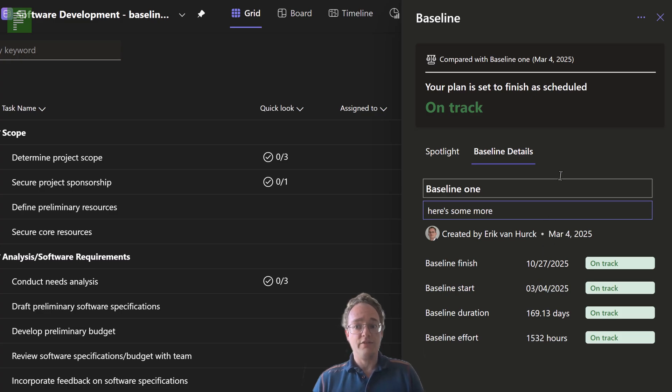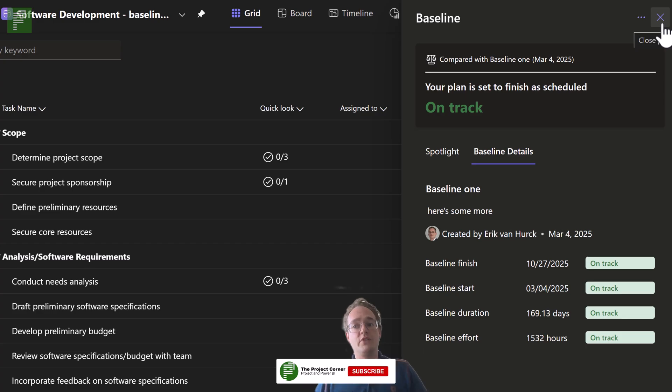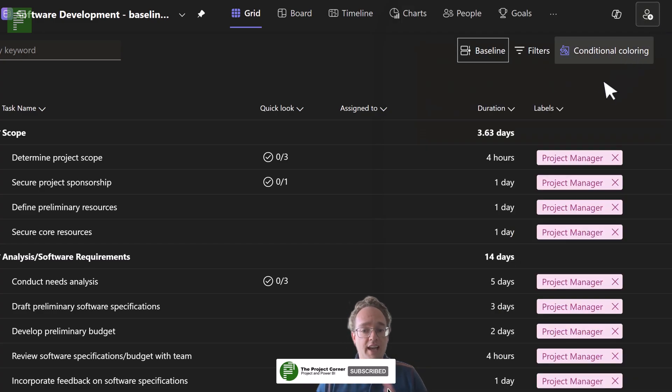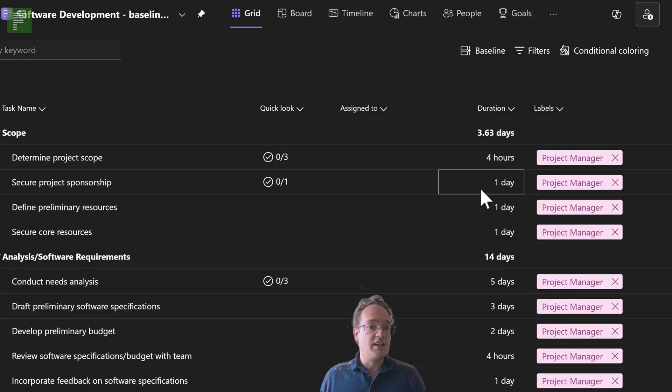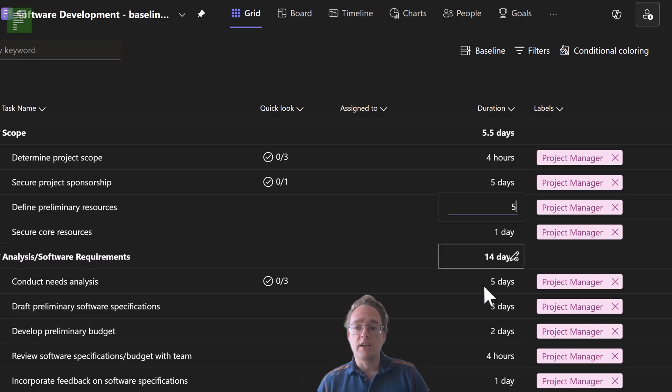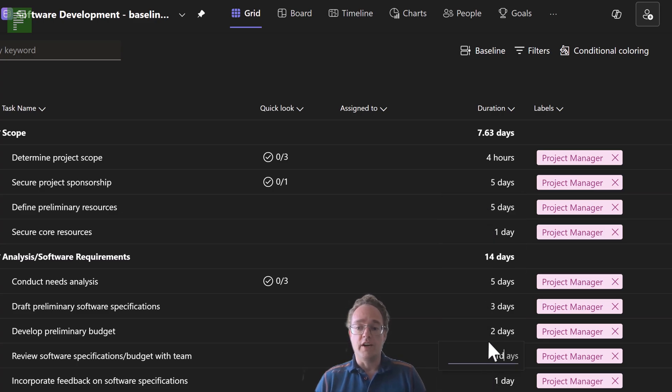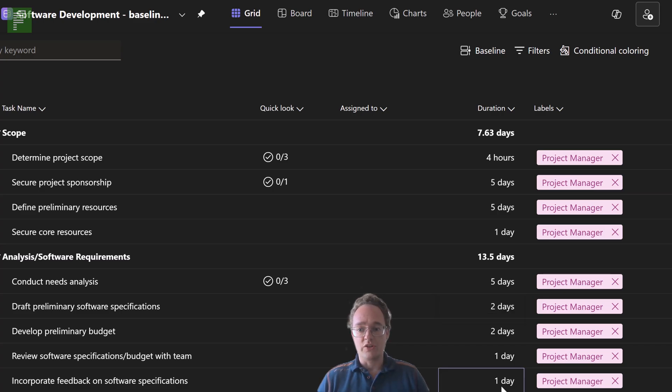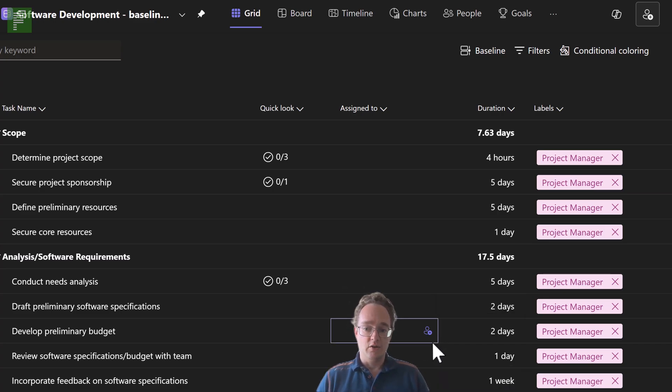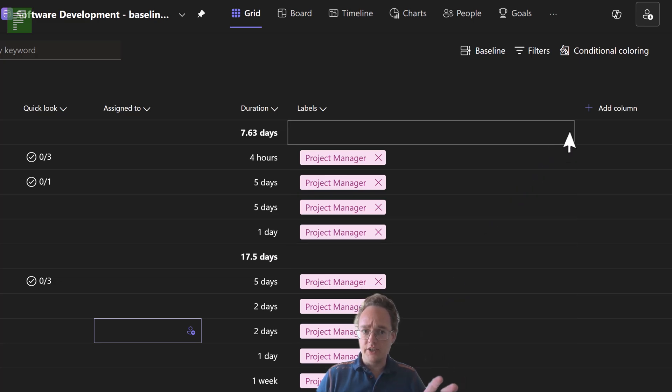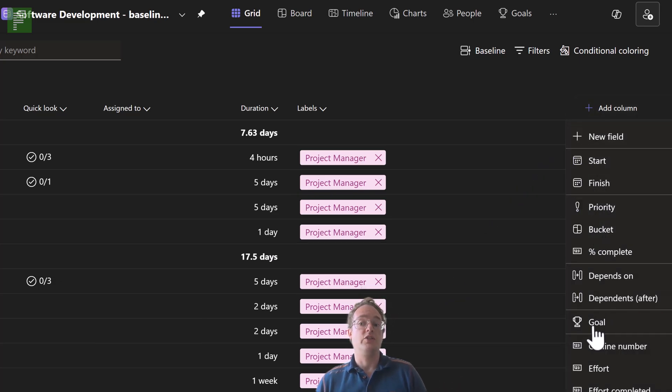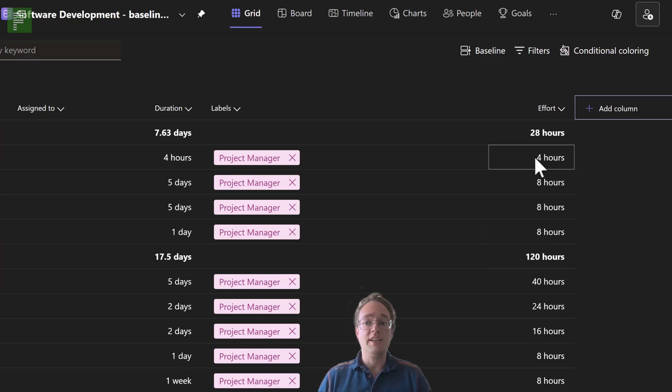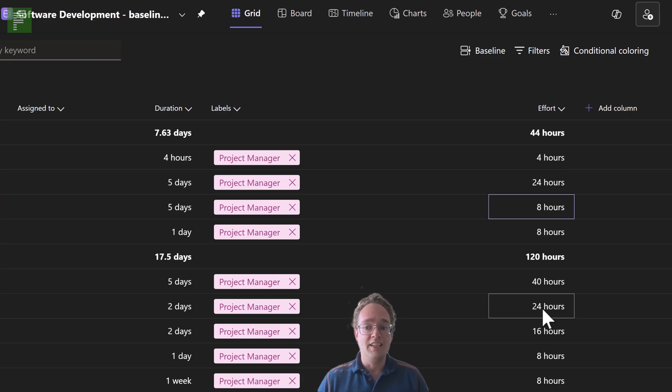We'll have some changes in our schedule. Don't forget that we also have the option to delete a baseline. Let's navigate to our duration for some of the tasks. Let's change this one to five days and let's have another change here or there. The four hours is not something that I would use in a schedule, so let's change that to one day and one week. And apart from the duration, it's also important to have effort, which used to be called work in Microsoft Project. We have the option to increase or decrease according to what we need.